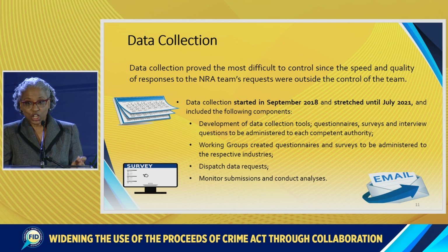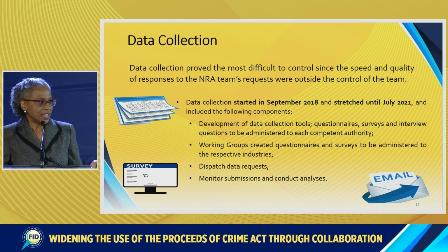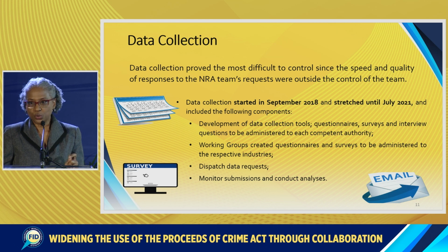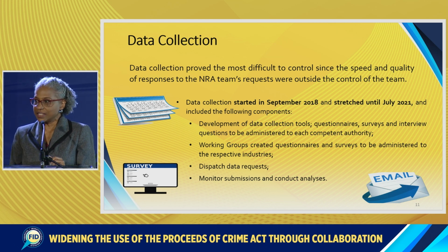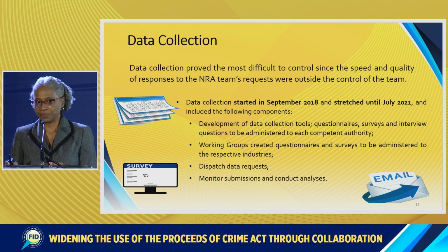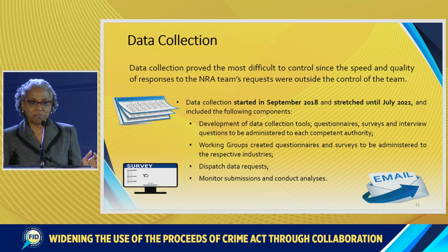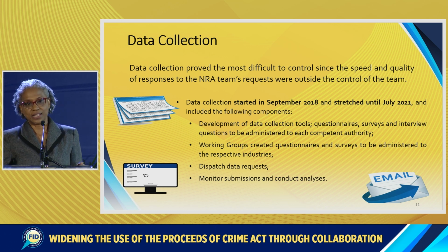And that is because, as I think it was mentioned earlier, I think Selvin, you mentioned it, every single agency, every single institution collects statistics in a different manner, counts in a different way, saves their information in a different format. So can you imagine having to sort, sift, go through, pick sense from nonsense going through that